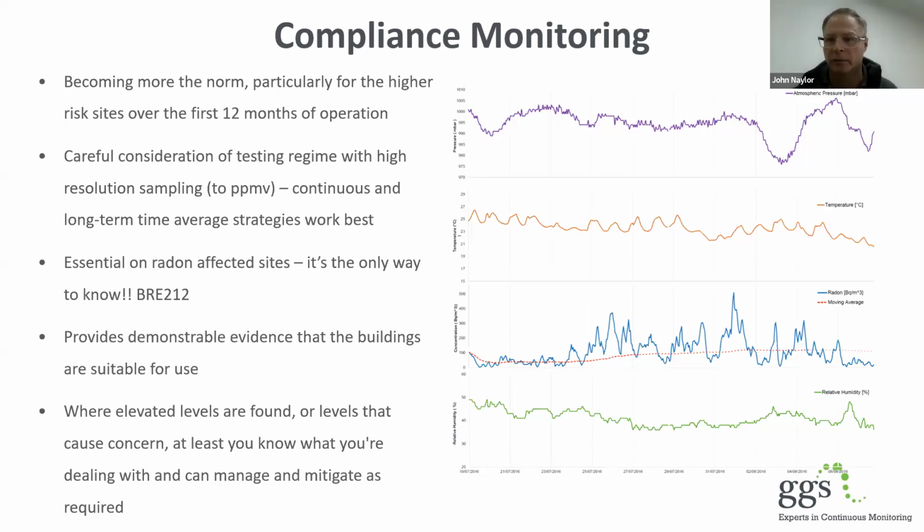And we should be doing this for new build. We're just not doing enough of it, in some regards, particularly radon. So how much needs to be done? Well, depending on the risk, of course, that's variable, but I would have it in your head something along the lines of the first 12 months being quite critical to collect your data set to show that it's working and good. You develop that based on what the risks are and what you've done.